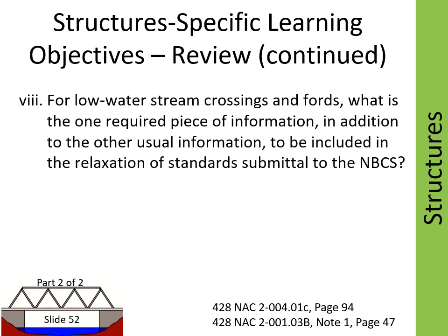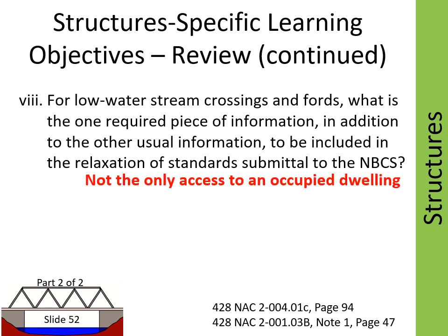Question 8. For low water stream crossings and fords, what is the one required piece of information, in addition to the other usual information, to be included in the relaxation of standards submittal to the Board of Public Roads? The answer is that the road is not the only access to an occupied dwelling.